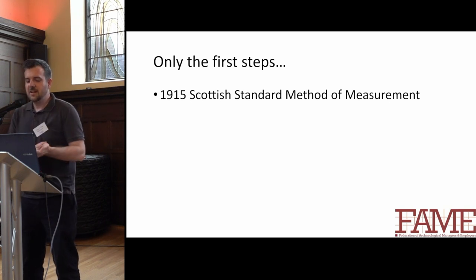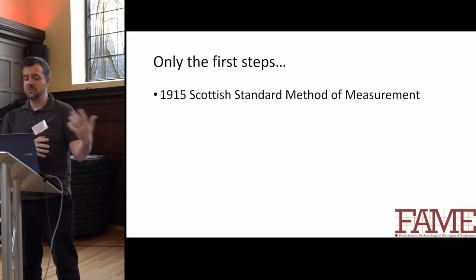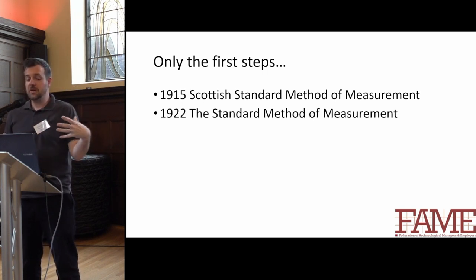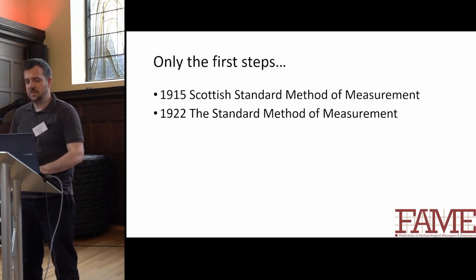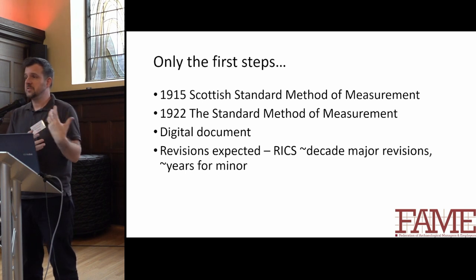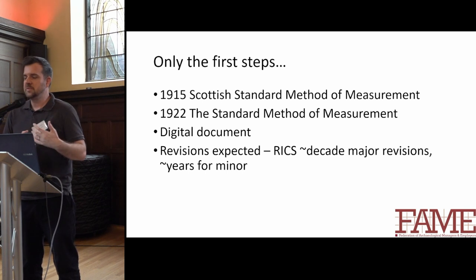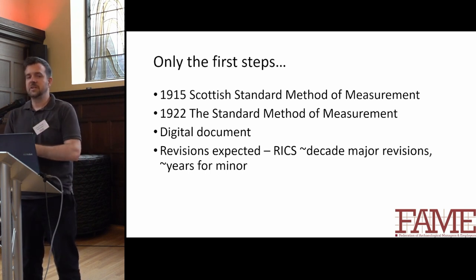I should also say this is only the first steps. The original standard method of measurement, the original bill of quantities put together by construction, was originally started in 1915, and the current UK-wide one was 1922 — so they've had a hundred years on us. We're going to be creating a digital document so it can be updated, and we expect it to actually be updated as people start to use it and revise. Ricks updates theirs with major updates about every decade and minor ones every couple of years. Initially we think with the digital one we'll be updating it quite a bit. So this is very much a work in progress, and the first draft will be out soon for everyone to test and hopefully provide feedback on.